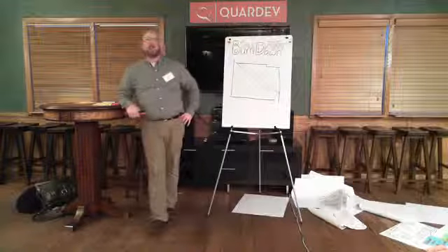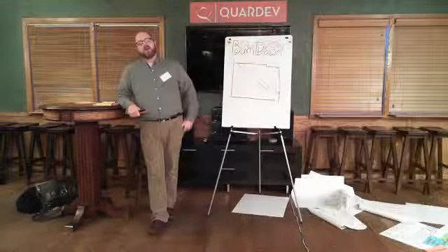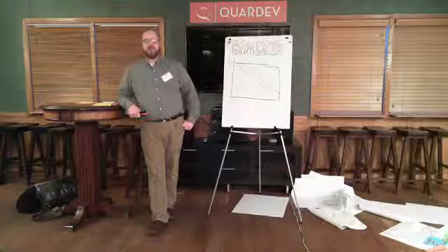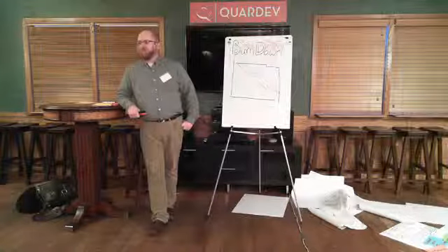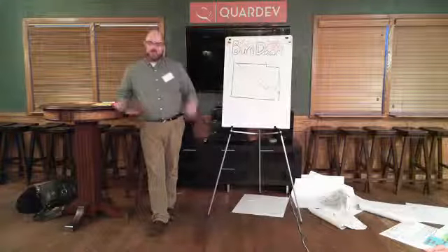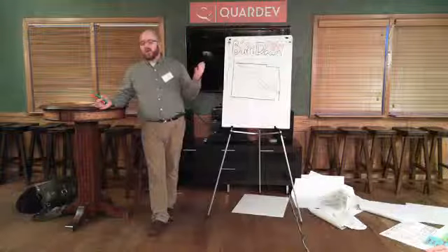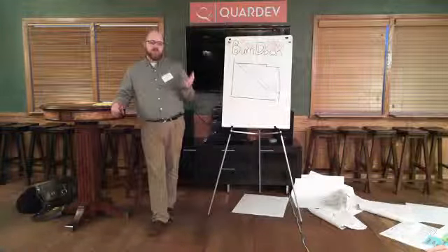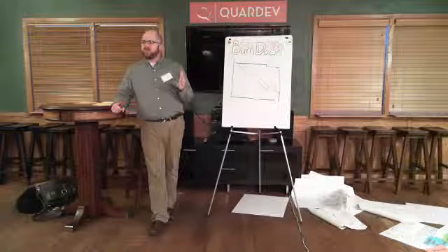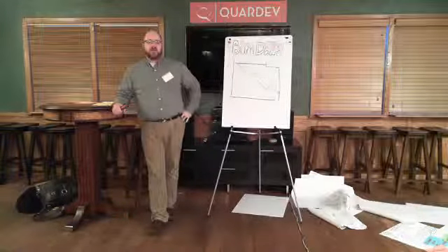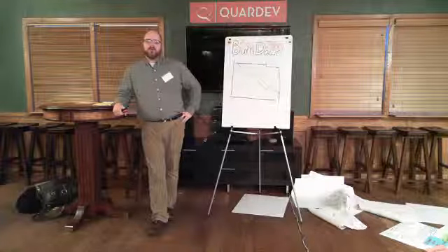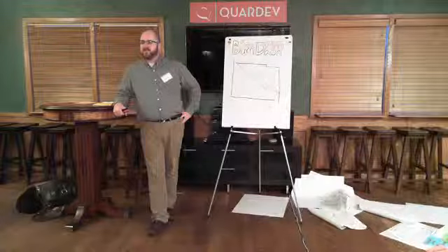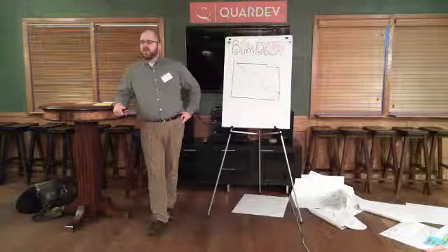There's a lot of variables there. Obviously, whether your team has done it ever is one of those, but also how familiar the work is. The longer your sprint is, the longer your planning is going to be necessarily. My ballpark figure is 10 to 15% of your time is probably spent in planning. That can be surprising: if you have a 3-week sprint, it's 120 hours. 10% of that would be a day and a half.